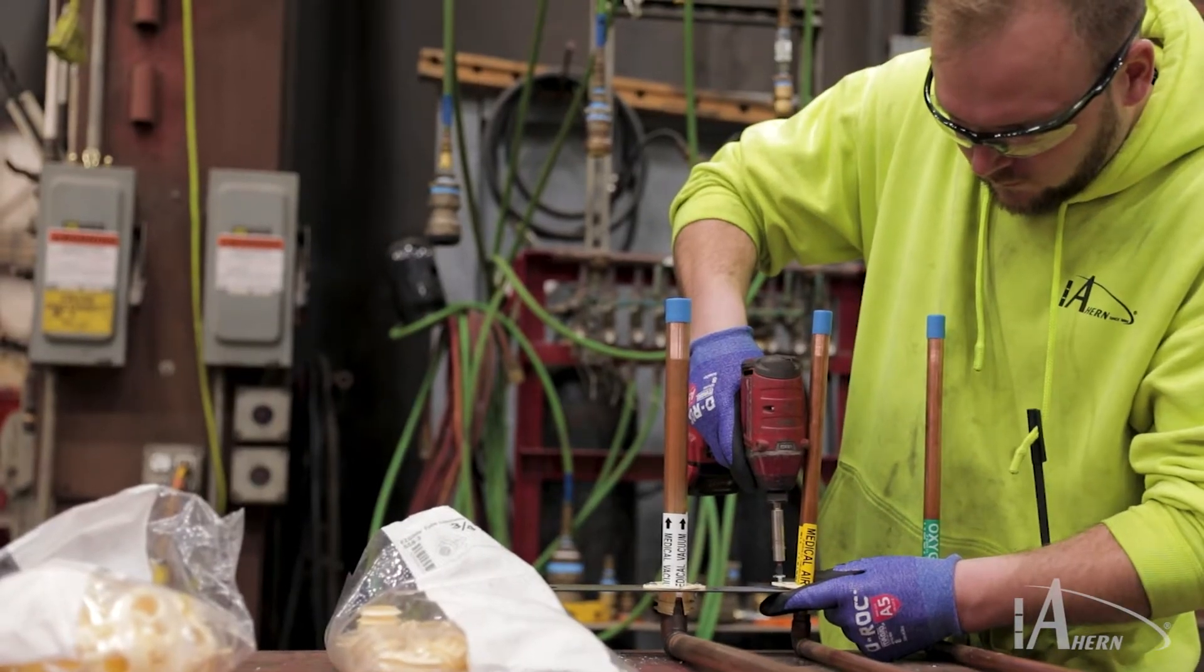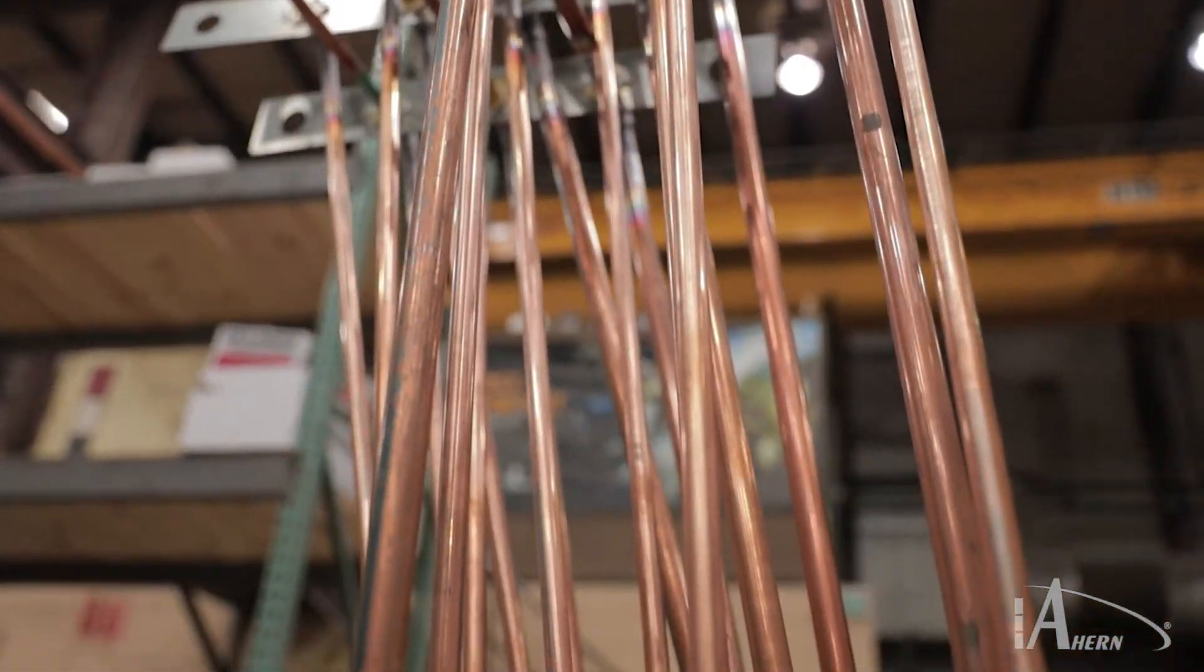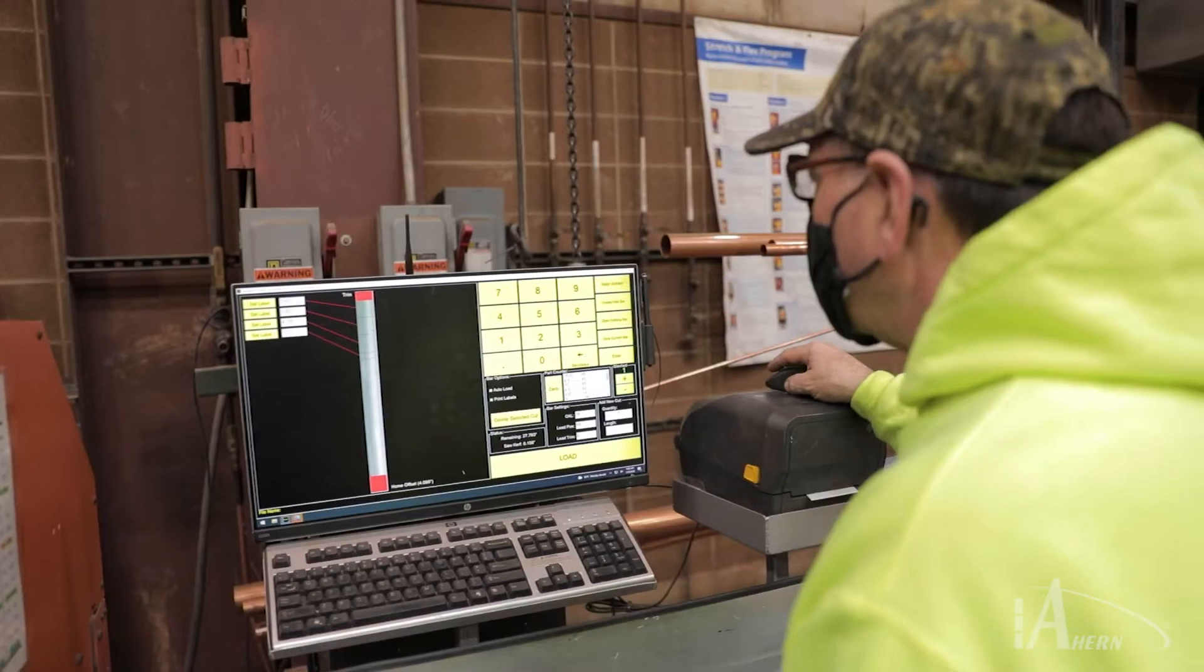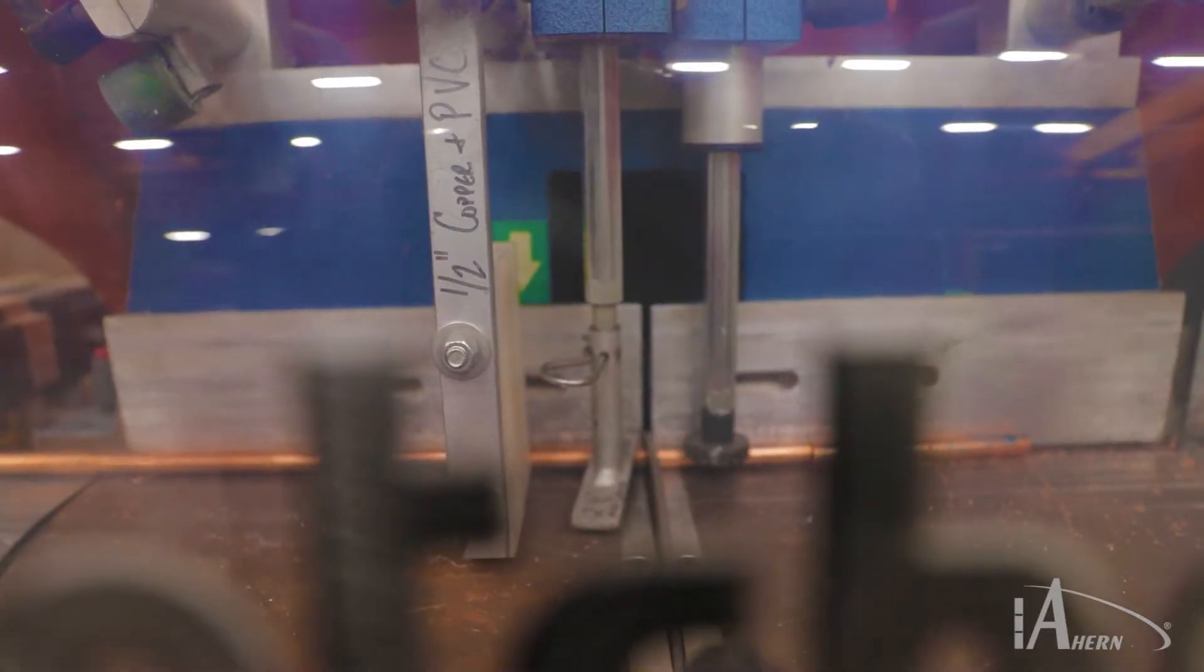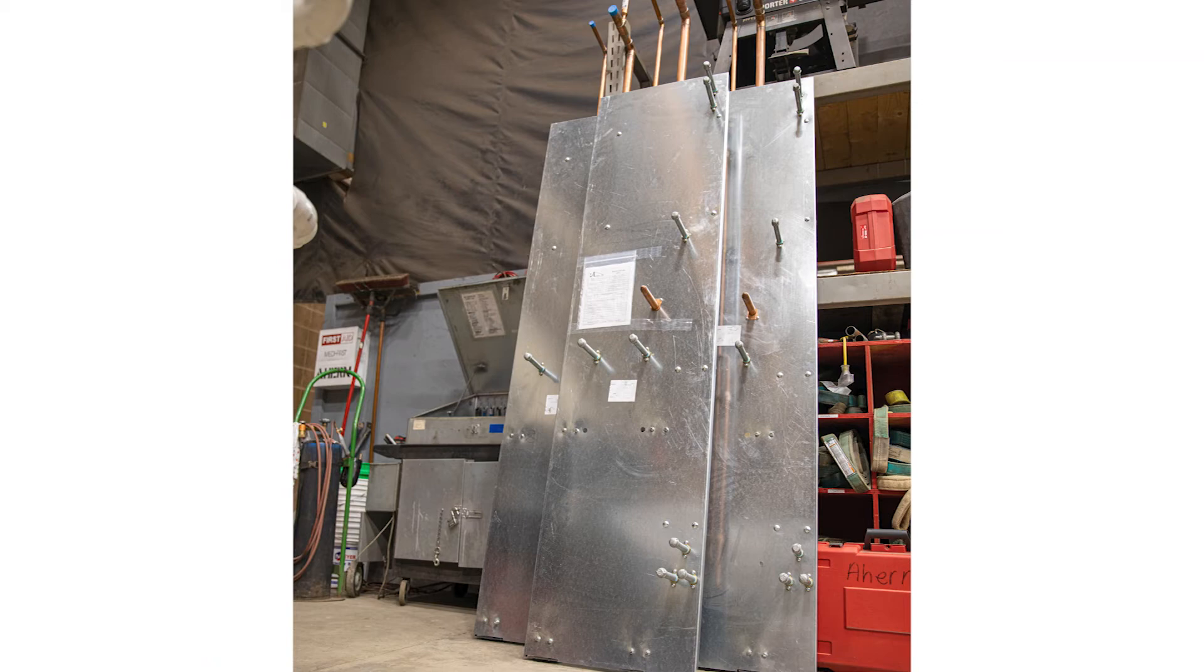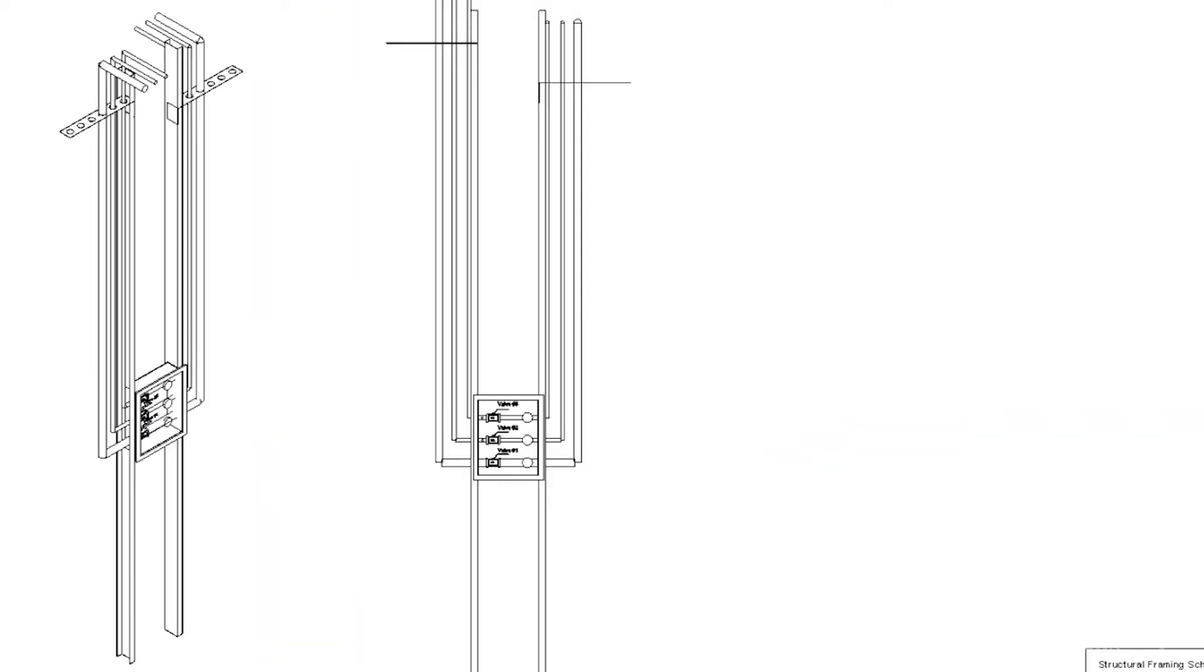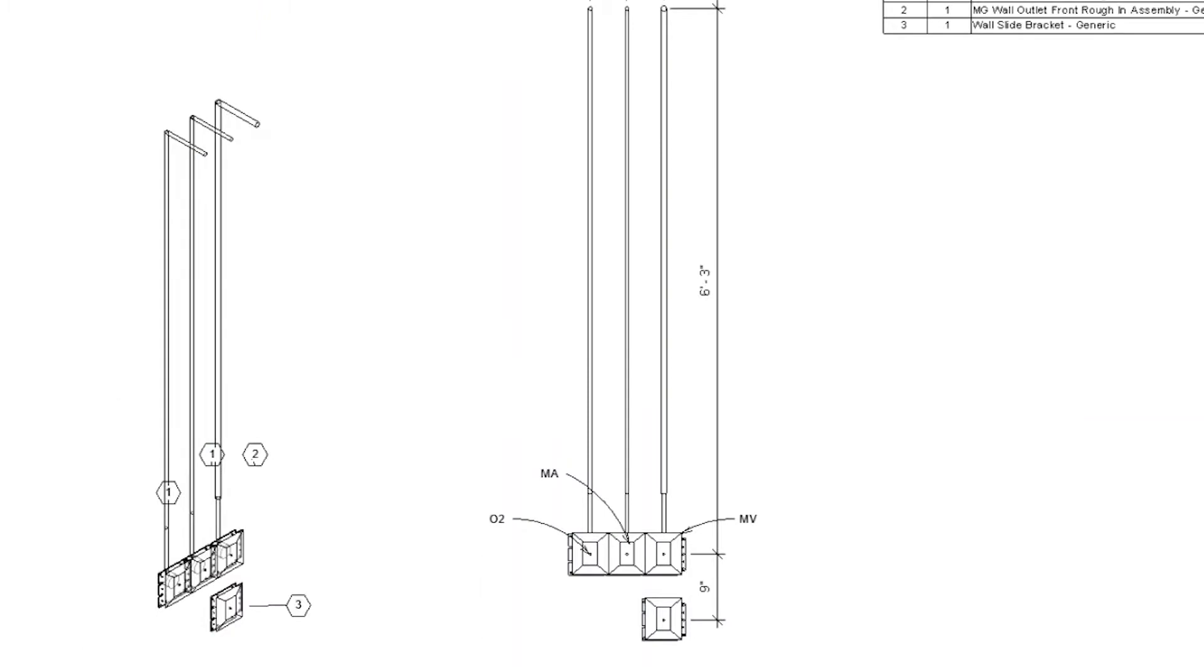Following the coordination and sign off of areas of the building, we begin the process of generating fabrication drawings for our shop to build portions of the systems off-site. This includes such items as showers, clinical service sinks, backflow preventer racks, dome bell boxes, and med gas outlets.